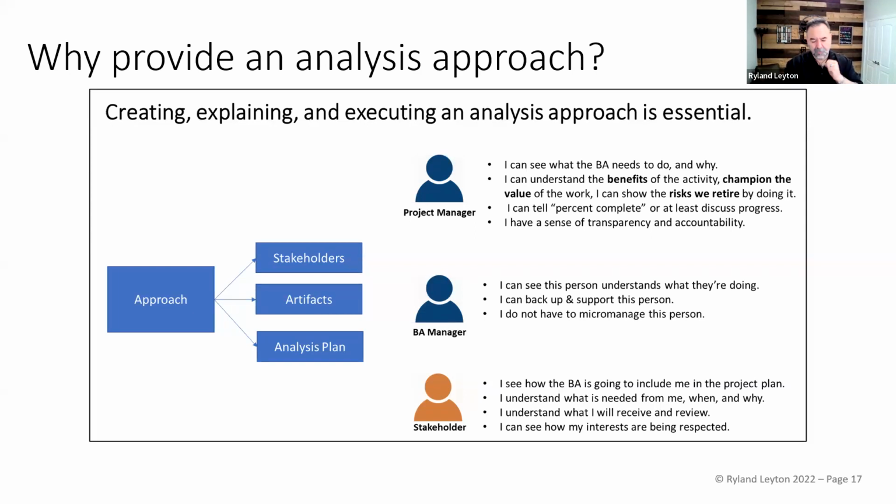And the challenge there is to make sure people understand you are burning your capacity as we work through the sprint cycles. If we have a defined or expected capacity of, using the samples I've given you, 10 sprints to get our work done because we expect it will take between 8 and 10, so we budgeted 10. Well, okay, if we're at sprint 5 and you don't see the key things you expected to see, at least on the roadmap here, something's really wrong.